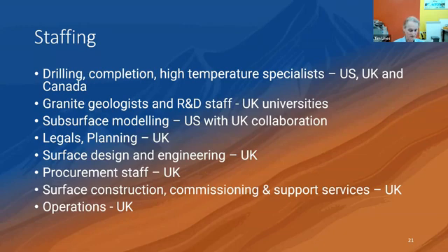Staffing, again, you need to think about: do you have the skill sets in country to do what you need to do? We don't. So certainly there's no one here who can drill these temperatures, so we need to go to the States for that, or Canada. And for completions, nobody in the UK or indeed Europe can frack a well in the ways that we need, sort of these long fractures. But in terms of the rest of it, that's down to European expertise.